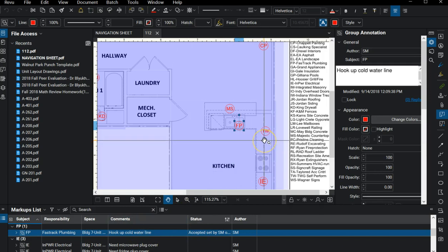Okay, but this again is a way for the general contractor to convey issues with the unit that need to be addressed before the owner walks the unit, or the owner is making this list and is conveying to the general contractor, these are the issues that you need to take care of before I accept this unit. So again, in its most basic form, a punch list is just a means of communication for work that does not meet the requirements of the specification or the contract or the documents.